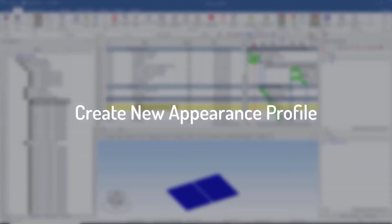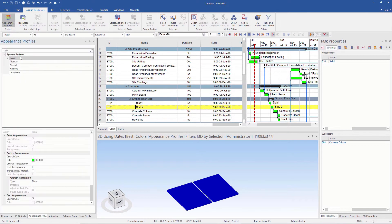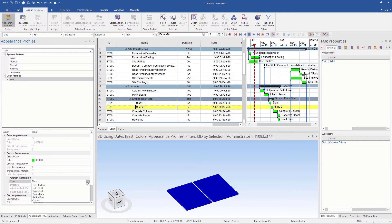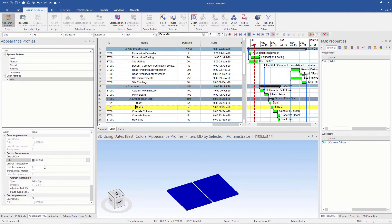Appearance profiles provide an indication of how a particular resource is used in a Synchro project. To create a new appearance profile, I go to the Assign Resource tab and then Appearance Profile. I create a new appearance profile by right-clicking and then Add. I give it a name called Slab. We can see various options related to appearance. I change the growth simulation, which controls the animation during construction to give a realistic view. I select the option Left to Right and choose the color. Note that Slab is the active appearance profile now.